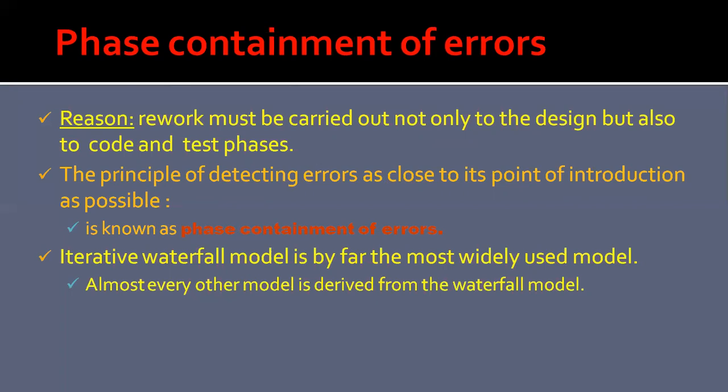For example, if a design problem is detected in the design phase itself, then the problem can be taken care of much more easily than if the error is identified at the end of the testing phase. In the latter case, it would be necessary not only to rework the design, but also to appropriately redo the relevant coding as well as the testing activities, thereby incurring a higher cost.